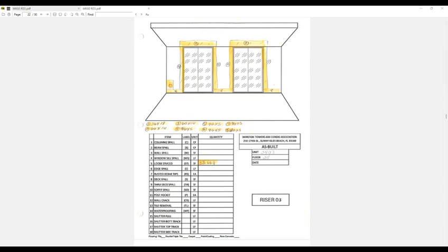And I will say, as Carolina said before, it's in your contract that even after the last payment to Coast, that does not waive your right to complain or audit or do anything. That's how we write our contract. It's there. So if you want to go back later on, you're perfectly within your rights, and we're not going to argue with you. That's all I have.